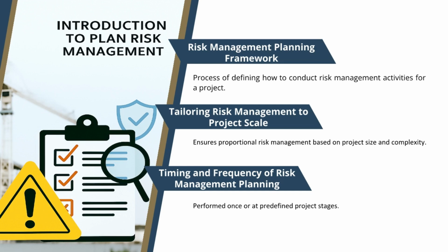For example, in a small residential building project, risk planning might be as simple as a checklist of safety hazards and a plan for weather delays. In a large infrastructure project like a highway or a bridge, risk planning is far more complex. Here, we might need detailed simulations, scenario planning, dedicated risk workshops, and advanced tools like Monte Carlo analysis.